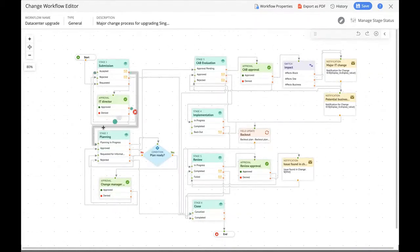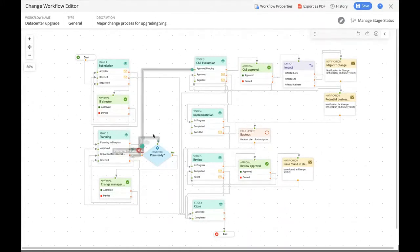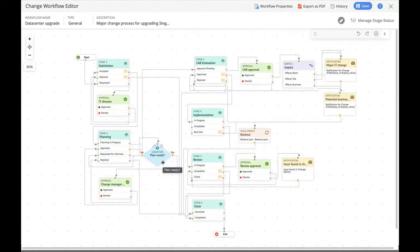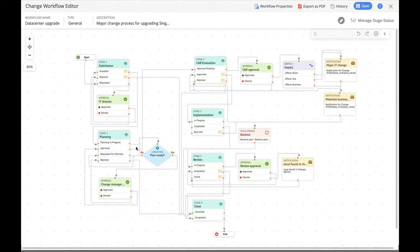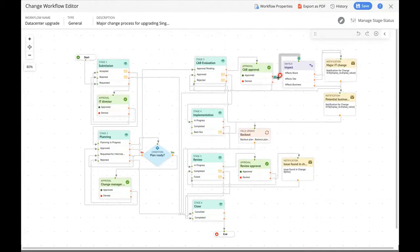If the plan is not ready, the change request status changes to 'requested for more information.' Once the change manager gives approval, the change request heads to the CAB evaluation stage. Under CAB evaluation, Zilker configured another approval. Once the CAB approves the change, the switch node is activated — the fourth type of node. A switch node is an extension of the condition node: it creates a multi-directional path, whereas a condition node only creates a bidirectional path. The switch node takes parameters of the change request — here, whether the impact affects a block, a site, or a business — and creates different paths accordingly.